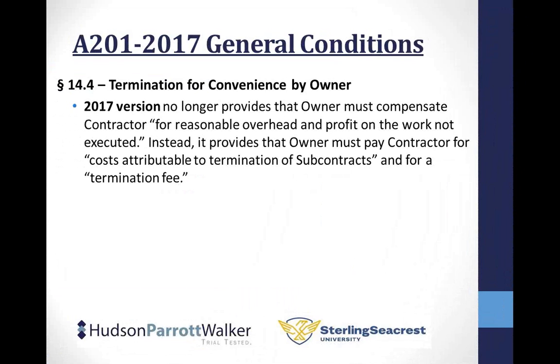So give some real hard thought in your operation to the right termination fee, and it could be scalable. It's not defined here. If you terminate us in the first quarter of the job, the termination fee might be X. If you terminate us in the second quarter, it might be Y, because you are, in fact, losing opportunity if you are terminated for convenience. And I am here to tell you firsthand, it is going on in your marketplace. Hadn't seen it in a long time, but I am seeing it particularly in the retail sector.